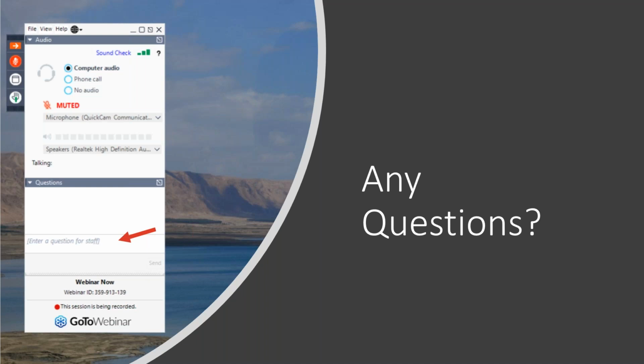Thanks, Tracy. The other thing is, like Ruth just showed, once you get through the wizard, it'll show you the things that you did not fill in. So if you don't have a list going into it, you'll have a list of what you didn't input when you get done with the wizard. And you'll know. To add to Rob's point, that same completeness check will be available outside of the wizard when you're writing up the scope in the page view. The tool will be identifying everything that is missing. So if you don't get it on the first go around, you do have a shopping list to go back and fill in the missing information.